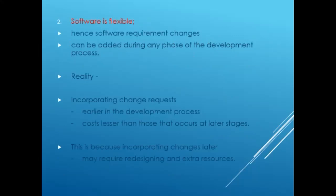The second customer myth is that since software is flexible, requirement changes can be added during any phase of the development process. The reality is that incorporating change requests earlier in the development process costs less than those occurring at later stages, because incorporating changes later may require re-designing and extra resources.